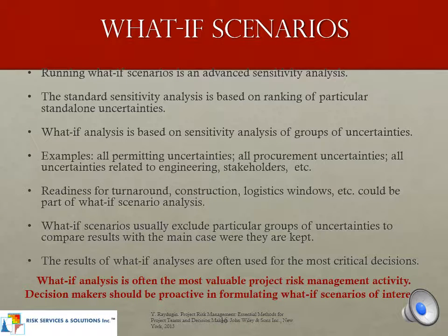Now, the running of what-if scenarios is an advanced sensitivity analysis. The standard sensitivity analysis is based on the ranking of the particular standalone uncertainties. The main thing we need to get out of this is what-if analysis is often the most valuable project risk management activity, and the decision maker should be very proactive in formulating what-if scenarios of interest to be able to kind of look at it ahead of time. What if this happens? What if that happens?